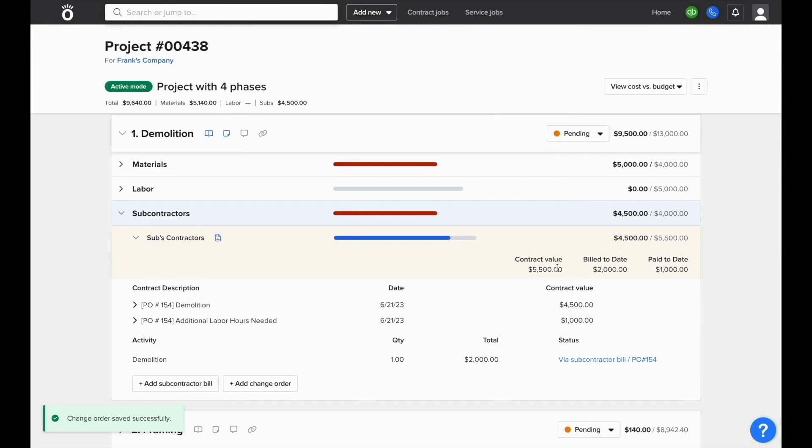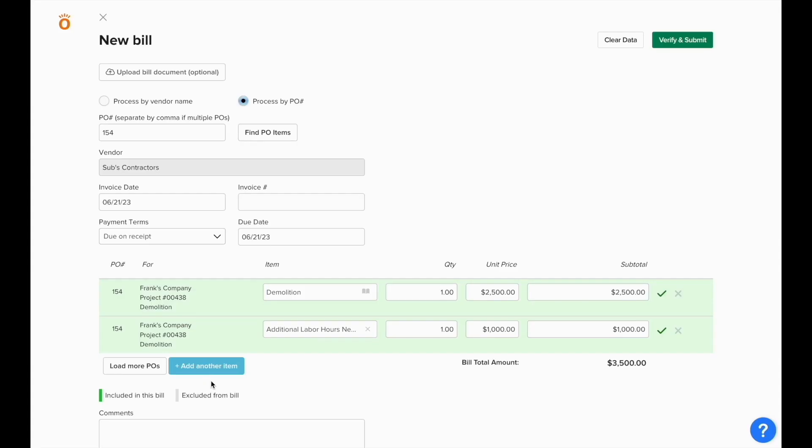Now the contract value is updated, and when we log a new subcontractor bill, Knowify will know the new updated value of this contract, and we can log bills against the additional balance that was added via the change order.